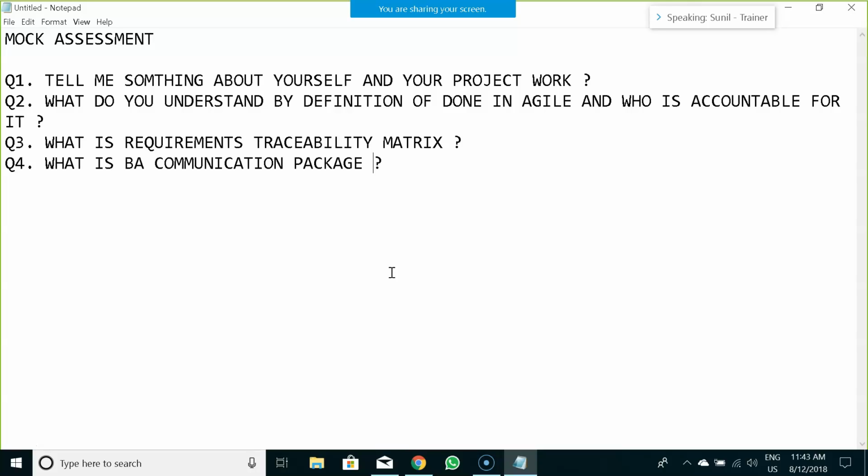Whereas if you consider the same case with a business stakeholder, they may not be interested in these UML use cases. They would need high-level documentation like a BRD, a business case, or a proposal plan. So you first have to identify the stakeholders present in your project, then group them on the basis of their interest, and then decide the package, like what you need to share with which group of stakeholders, because you cannot share everything with everyone.